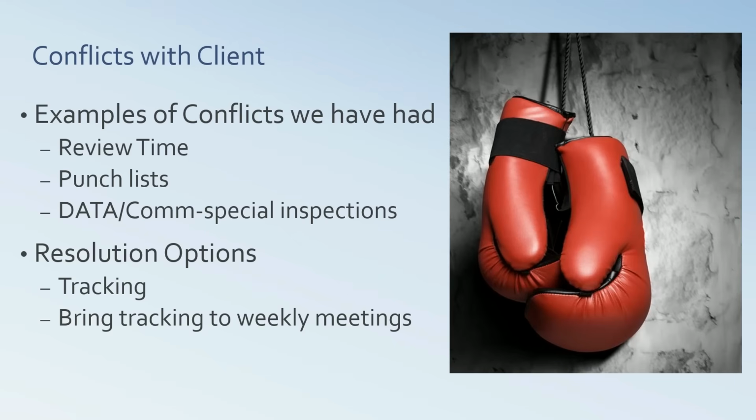No. And then what will happen, that conflict, if you turn the tables on that and say, well, we'll go back to the design team, we'll go back to the client, we'll issue an RFI, and we'll figure out what's going on. And if they deny the RFI because they don't want to spend the money, then it's done. That happens. Then it's dead. And then if they say, oops, we really should have done that, we can't get away with not doing it, then it's a change order. Yeah, and either way, it's not your fault.